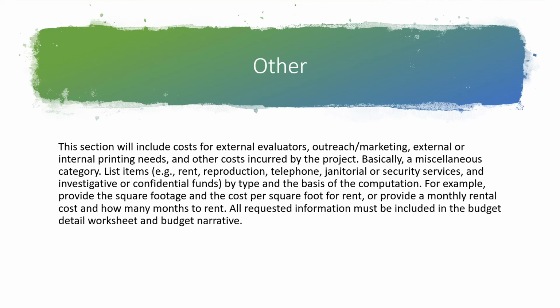If you had to rent a space to run your project out of, some agencies and institutions charge rent for research spaces, and that's basically because they want to keep the people who are getting funded to have a space to work, and people who are not getting funded to not take up space that somebody could actually use, right? Reproduction might be the use of other people's materials, and you have to pay them a fee for that. Maybe you need a dedicated telephone line. Maybe you need some cell phones to go with people when they go out to do field work. Maybe you're hosting events, so you need janitorial or security services.